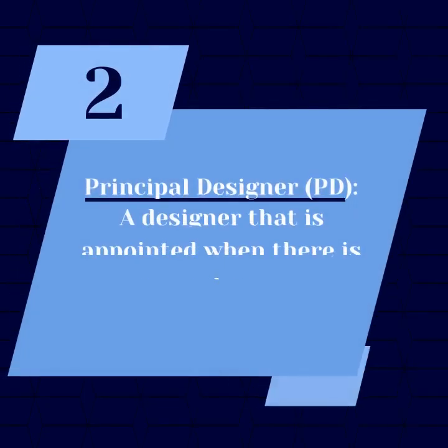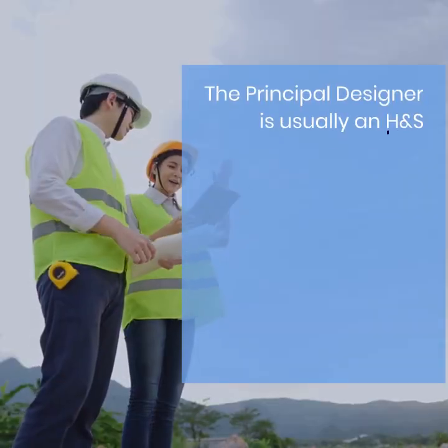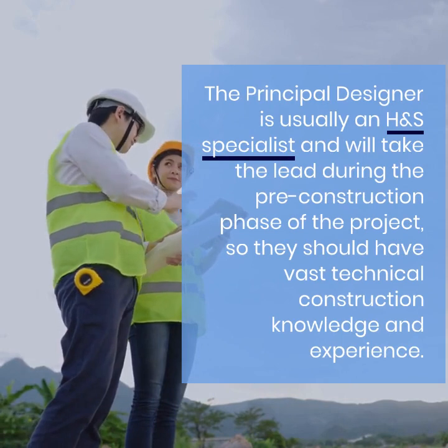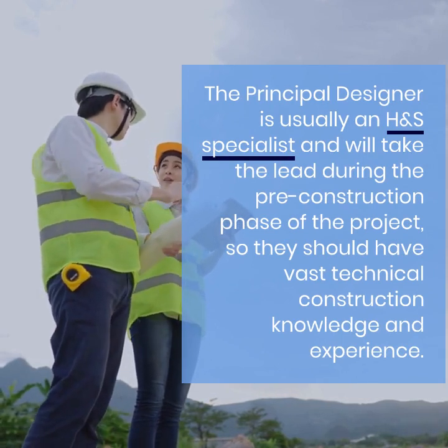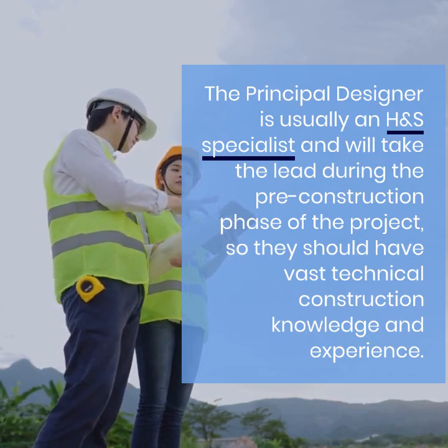2. Principal designer. A designer that is appointed when there is more than one contractor on a project. The principal designer is usually a health and safety specialist and will take the lead during the pre-construction phase of the project, so they should have vast technical construction knowledge and experience.